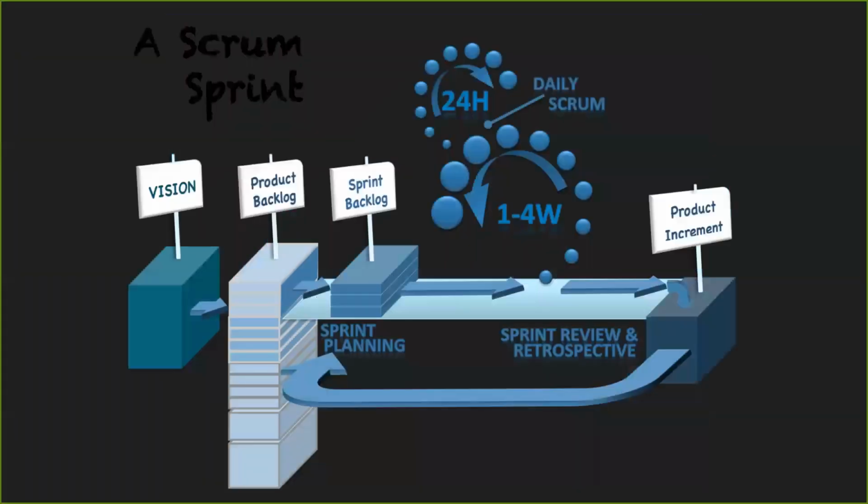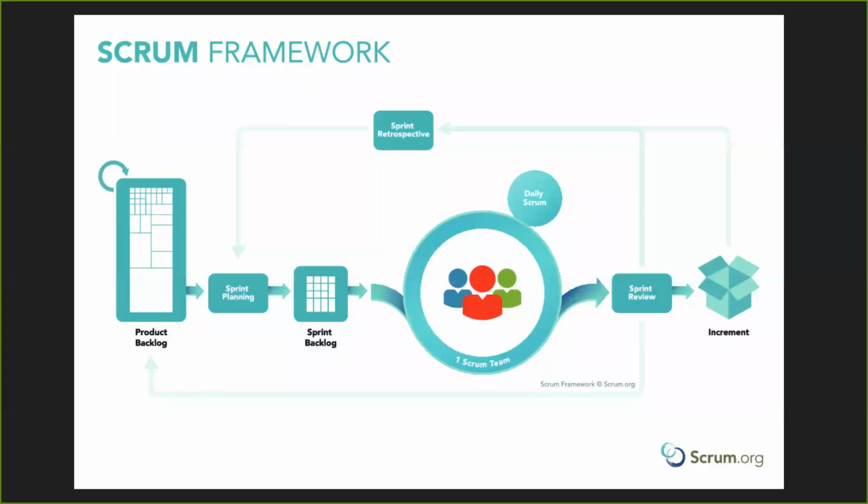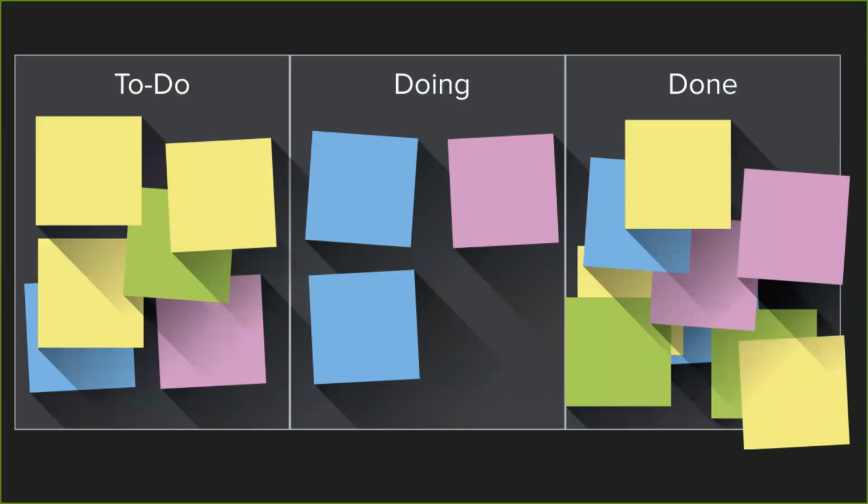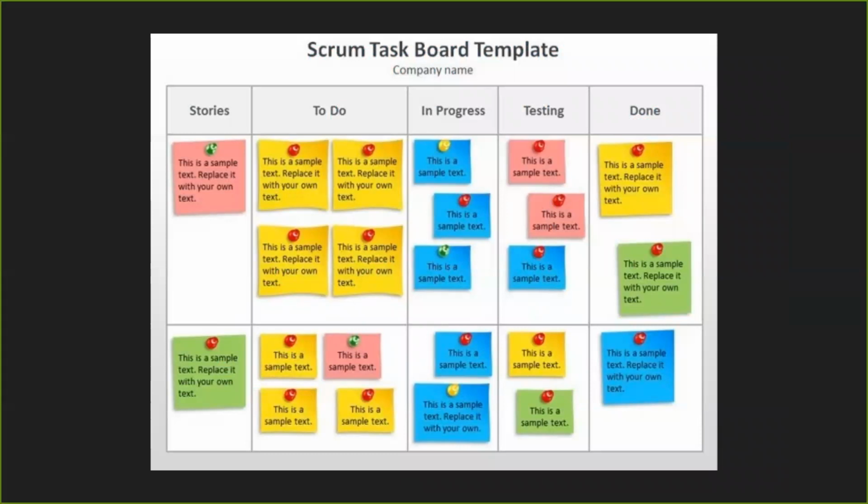So the next thing: usually when you're doing a sprint, you pull off a set of user stories, and then the development team will break that down into actual tasks. Like, what do we actually need to do to implement this? And usually what we do is create these Scrum Boards. So this is probably a better example. You've got your user stories you're going to address, then you've broken it down into actual, full tasks.